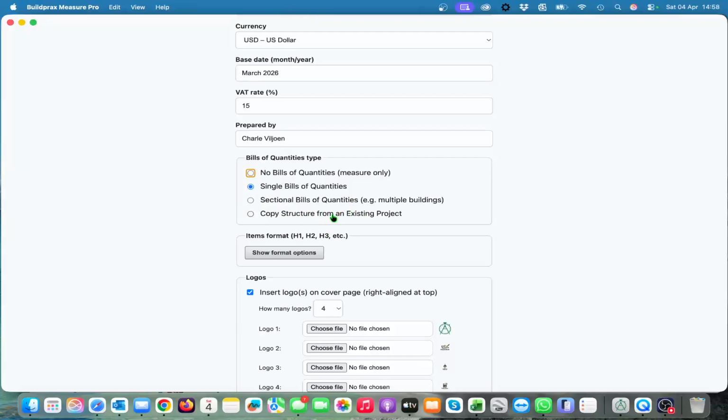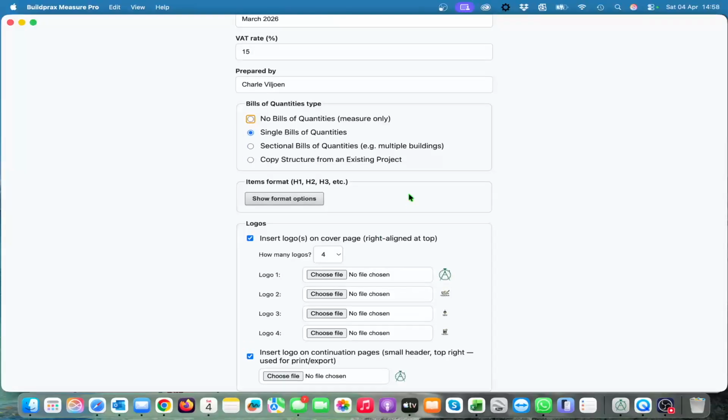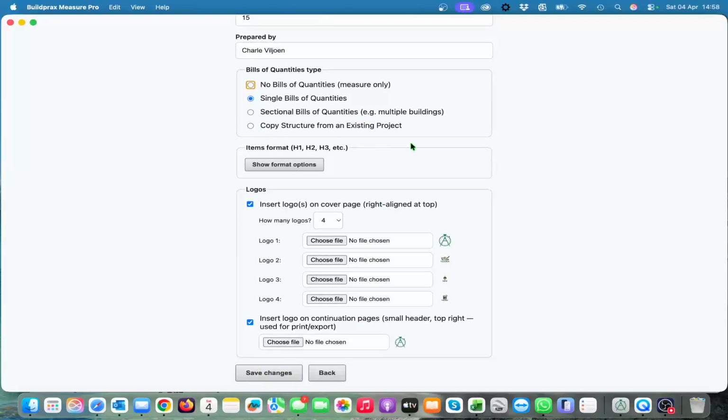So in your new project, you're just going to measure the new areas, and if it was for carpets or tiles or the construction area or concrete or the walls and whatever you wanted, those links from the drawing to your bill of quantities items will stay the same. But you can play around with it.